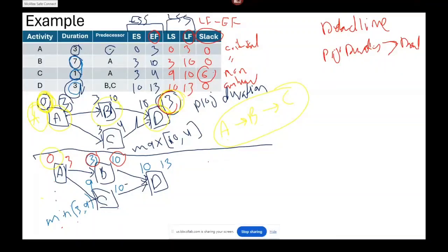For example, if we calculated the project duration using the critical path method and it resulted in 13, and the deadline according to the statement of work was 10, then according to the critical path method, we cannot complete the project before 13. It is the earliest the project can be completed. This means that if the deadline was before the duration, we are failing to meet the deadline, which is a form of project failure.